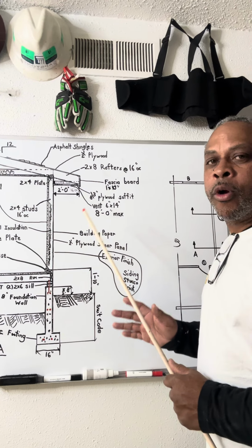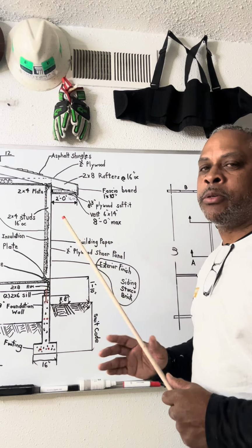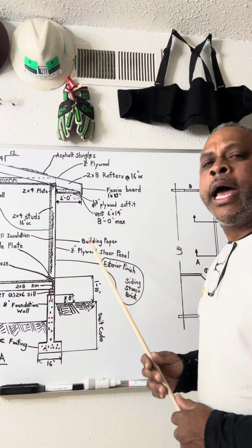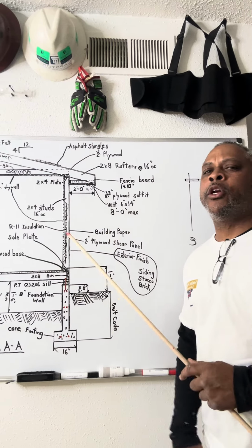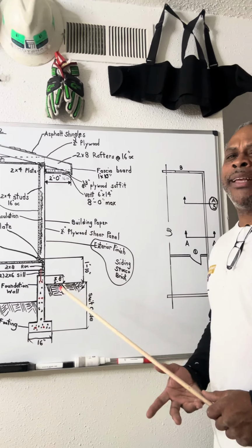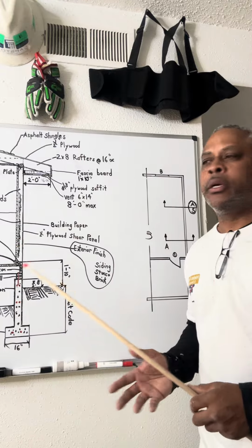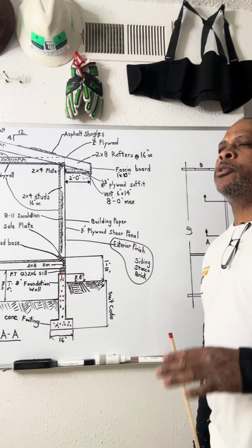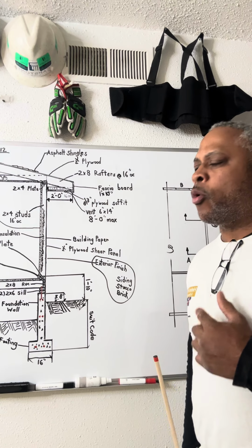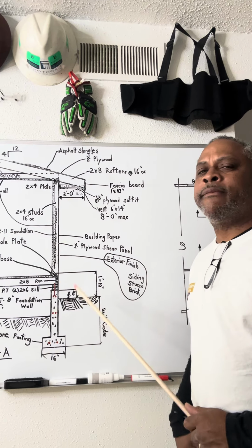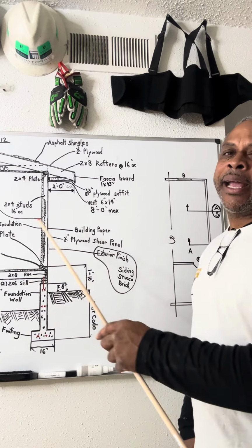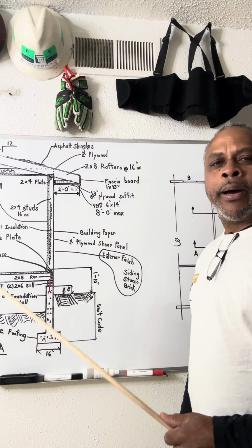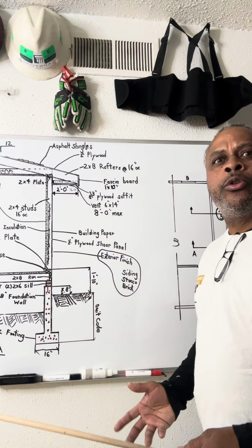Every detail on here is for you to be able to estimate and know what supplies you're going to need for this job. I've seen a lot of guys not even look at this. They were novices. They just gave a price: oh, how much are you going to charge? Do not ever give anybody a square footage price off the top of your head when you have not seen the plan. That man can have a deck wrapping around this house, and you're just thinking it's a basic plan and going by square footage. A lot of guys lose their tail that way.